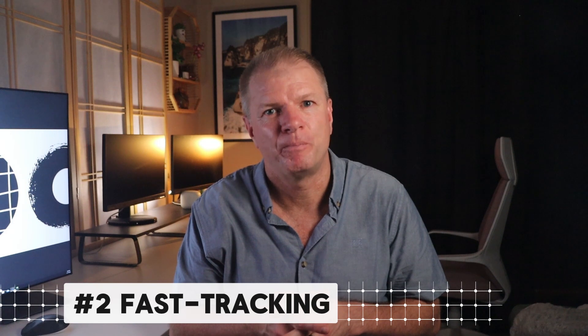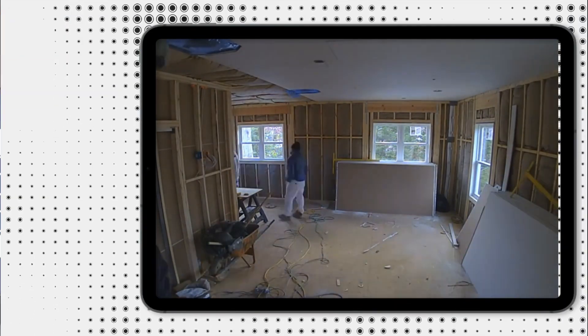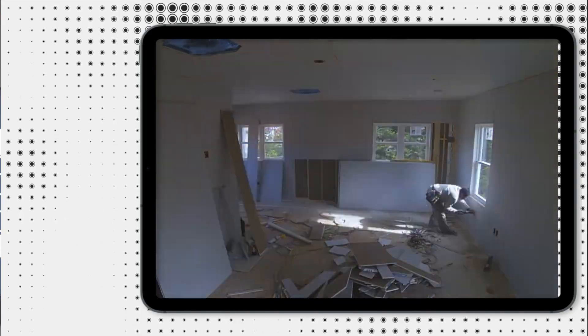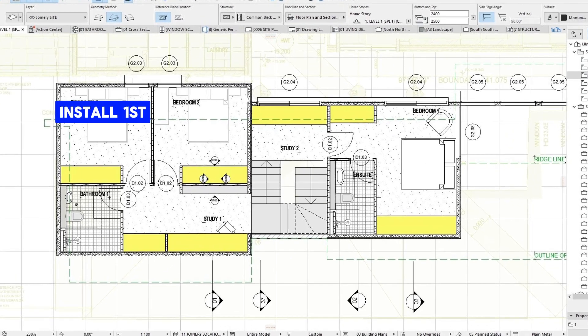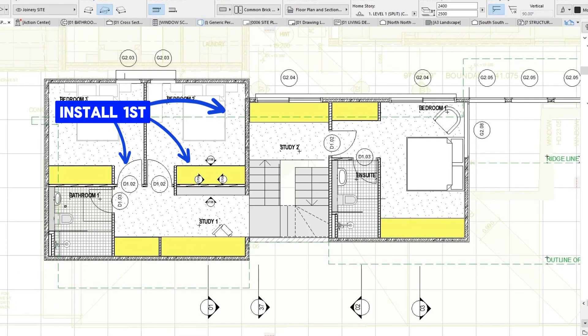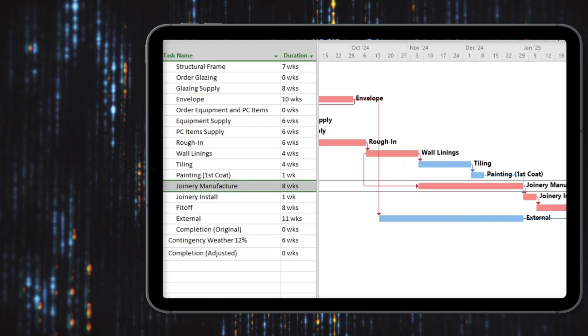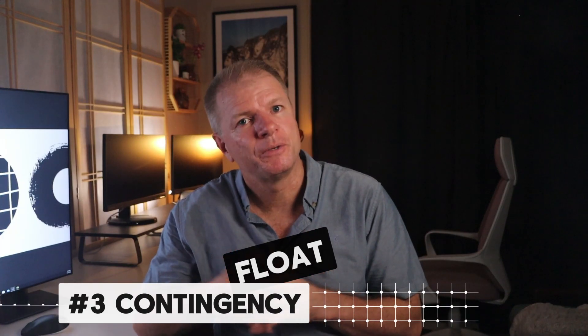On to our second topic of fast tracking — let's use joinery as our example. Without fast tracking, the joiner would wait until all the internal linings had been installed, then arrive on site, measure up and start manufacturing the joinery. Fast tracking this process would see linings to bathrooms, kitchens and the robe nooks installed first before advancing to any other area in the house. This would allow the joinery to be measured sooner, perhaps saving two weeks.